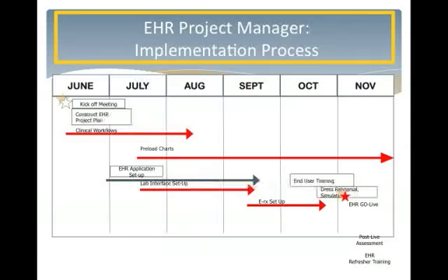I have come to understand the major milestones for the EHR project. This is a projected timeline of some of the more complex steps in the plan. They include kicking off the project, evaluating clinical workflows and designing them for the certified complete EHR, preloading vital clinical information from the paper records to the electronic chart, setting up the application and interfaces, training users, and preparing for go live.